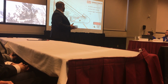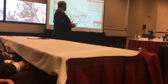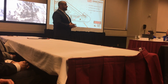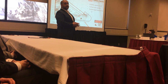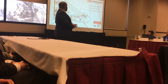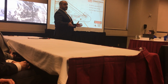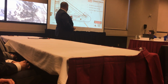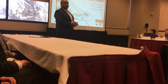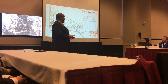Our crane, at about 125 feet reach, will safely hoist 36,200 pounds, and that is above the 75% critical lift limit, so we will have to implement a critical lift plan. We will implement a quarantined off swing radius and lift area. Material laid down will be right in front of it. Tractor trailer will pull up with the HVAC equipment and the MRI and CT when it's scheduled, hoist it safely, put it in place.